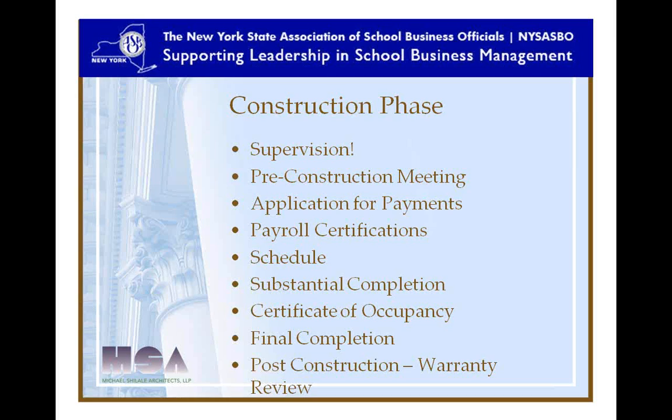On recent projects, we had a financial penalty of $36,000 if they missed the deadline by 1 day. That was what our client had felt was their damage. That's why it's called a liquidated damage. It has to be related to the costs you incur should the project go beyond the projected completion date. So if it wasn't going to be completed by, I believe it was November 15th, then there was a liquidated damage that didn't matter, but at least till December 15th. They almost missed that second month and would have incurred another $36,000 damage, but they got it done just in time for that. But that's really the only way to keep your project on time.